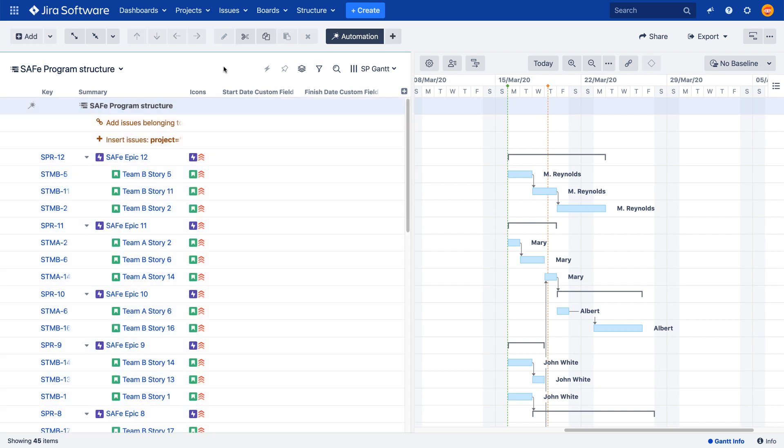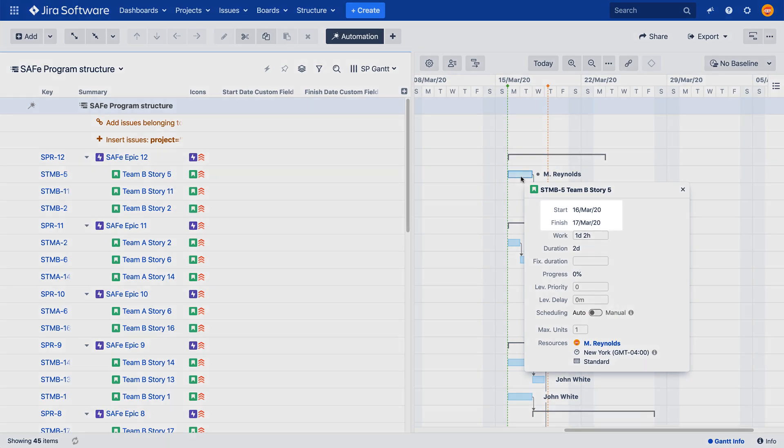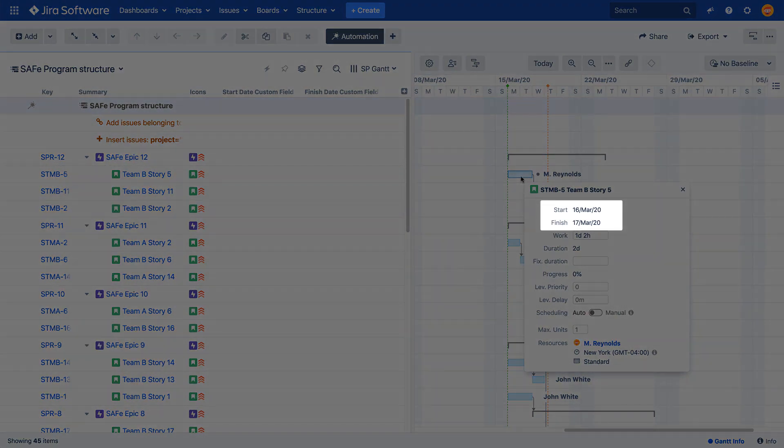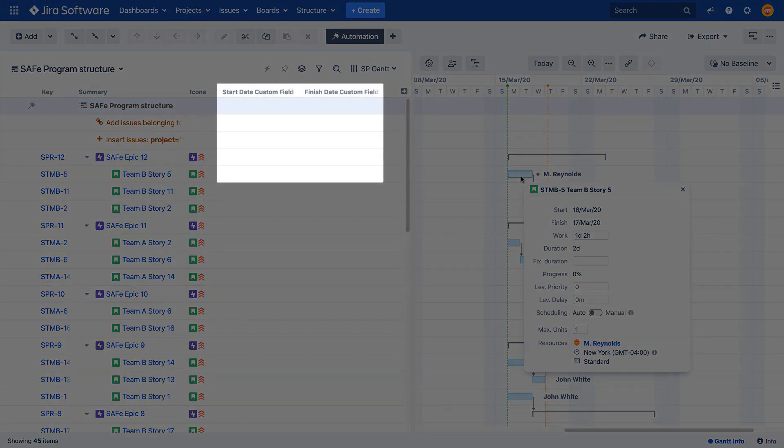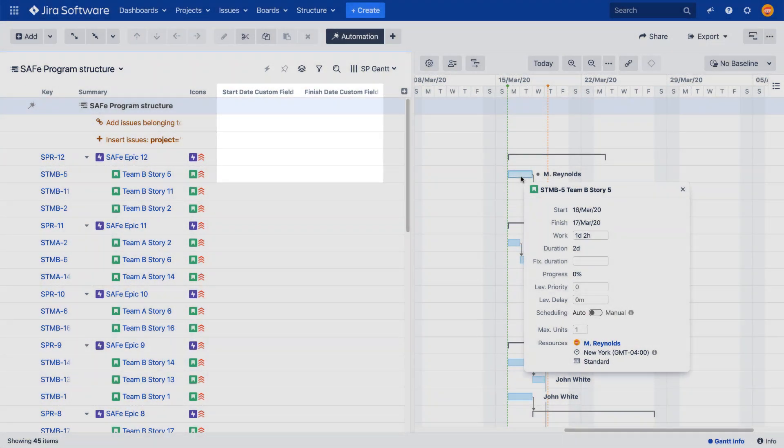Once a Gantt attribute column is added to your structure, its value can be written to a Jira field by the attribute to issue field effector. To show how this works, I'm going to synchronize start and finish dates of tasks on my chart with two custom Jira fields.